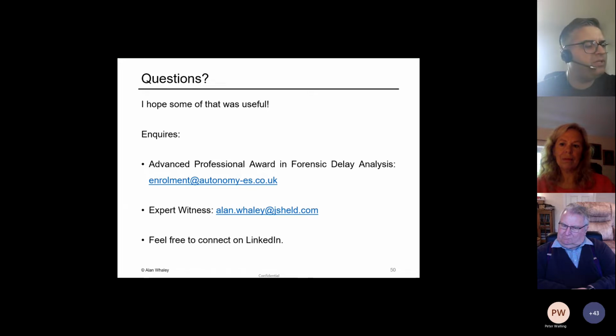However, some disputes under NEC are not like that. They involve multiple events that very often haven't been subject to any kind of assessment at the time. So the dispute's not usually about a specific assessment. It's usually a more broad, overarching dispute.